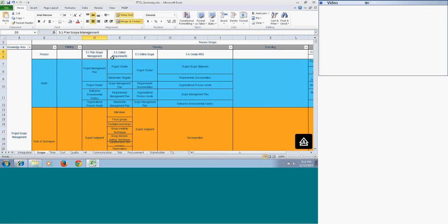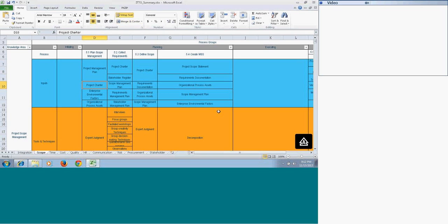The first process in the planning process group is Plan Scope Management. The purpose of Plan Scope Management is that it gives you a plan to execute all other processes in the Scope Management knowledge area. The inputs here for Plan Scope Management include the project management plan — the scope management plan is actually a subsidiary plan for your main project management plan, so the project management plan will be an input to it so that you can update that plan.